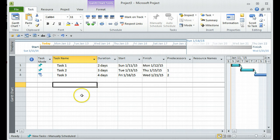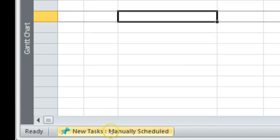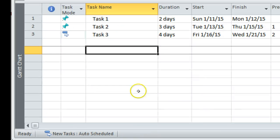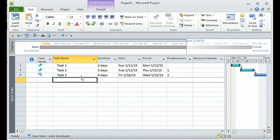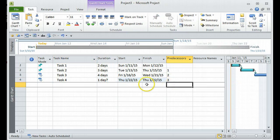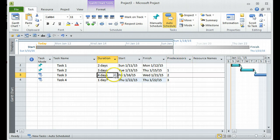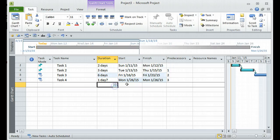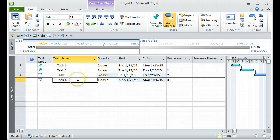The simplest way to switch to auto schedule is to go to the bottom of the screen where it says 'New tasks are manually scheduled', click on that, and select 'Auto Schedule'. Now if I create Task Four, it will be auto scheduled. If I set Task Four dependent on Task Three and change Task Three's duration to six days, Task Four will automatically start from the next day after Task Three finishes.